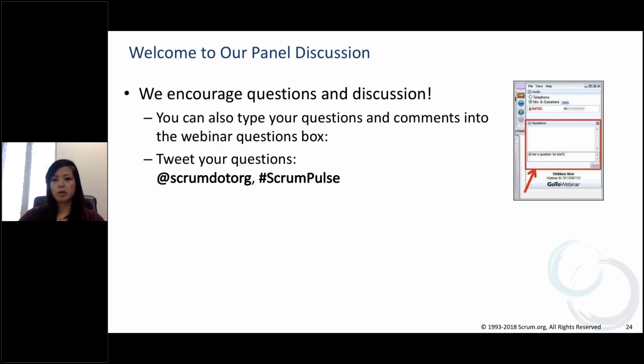We aren't breaking Scrum, so we should still have a sprint retrospective of what the Scrum team faced. What we added around it was what we call a sandwich, because we want to talk about what was happening at the Nexus level retrospective. Let's take those items back into our teams and talk about what happened at the team level, but also those different Nexus level conversations, and then take that into the third part where we can share it back at the Nexus.